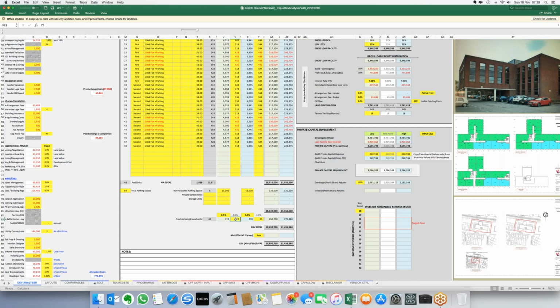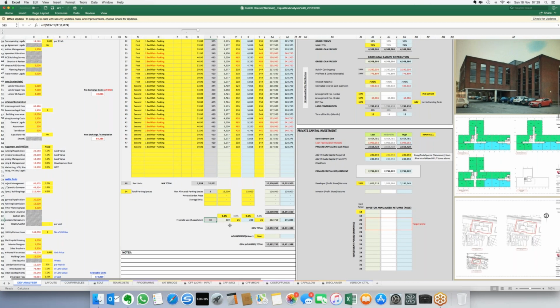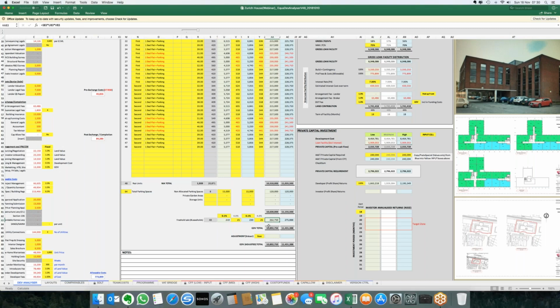And how we value the ground rents and the freehold sale is on a multiple basis. So we're currently achieving today 27 times multiple. So you can see I've throttled that back a little bit to 25 times. So there could be some additional value in there, but just to be slightly conservative and cautious at this stage. So how the value is derived is 48 units on a ground rent of 219 on a 25 times multiple. So 48 times 219 times 25 will get to that number.